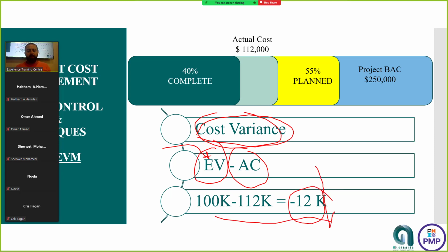When it is negative, what does that mean? It's a cost. Below cost? Are you below cost? You are not below cost. You are on a negative impact on the project. Negative value, it's always negative impact. What's the negative impact on a cost variance? Below budget or cost overrun? Cost overrun. So it's a cost overrun. Okay, it's not below budget.